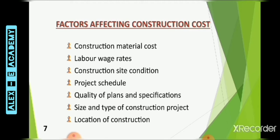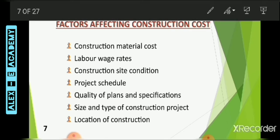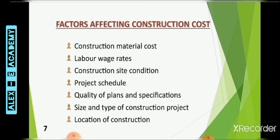Next is location of construction. If the construction site is far away from available resources, it increases the project cost. The cost of transportation of equipment, tools, and materials increases with distance and will increase the project cost.